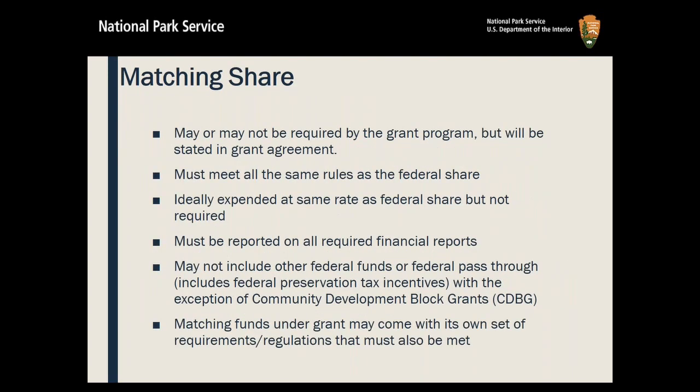Matching share. Matching share may not be a requirement of your grant program, but if it is, it'll be stated in the grant agreement. And all matching share has to meet the same rules that your federal share does. Basically, once your matching share is under the grant agreement, it's all considered one pot of funds, so they are all subject to the same rules and regulations.